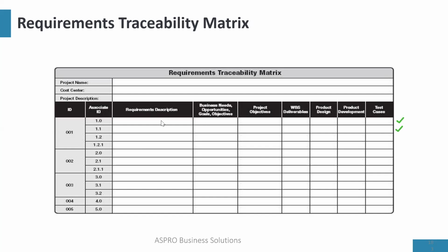Just like we said, we want the search bar to search for movies. When they develop the software or the website, someone is going to test that you can actually search. That's what a traceability matrix does. So if you're using a traceability matrix, it ensures that all the requirements are captured and developed and tested in the project. Okay?